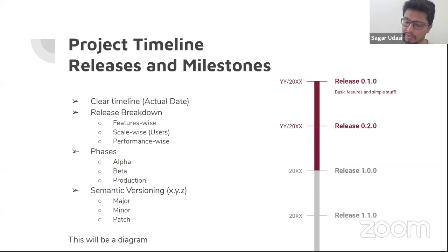And we know that we cannot handle the entire project at once. So if we break the project into logical releases, we might as well implement one release per semester. A group of students will be working on release one. Then another group of students will come and work on release two of that project. Basically new features, bug improvements, bug fixes, and all. So likewise, it becomes easier to divide the project into releases and then handle that.